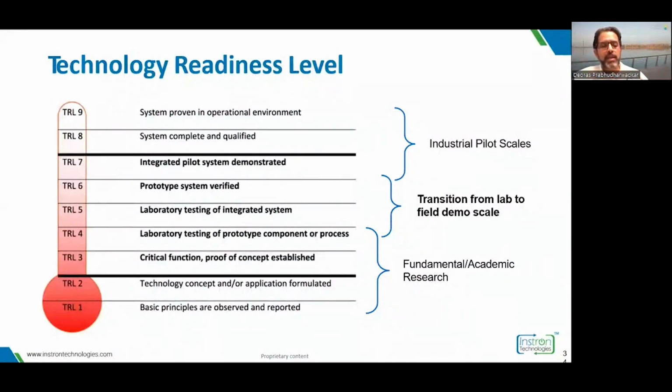at the lab scale. That's going to be the TRL 3, and the TRL 4 to 6 is where you start going out of the lab, from a bench scale to a lab scale, looking at perhaps the first opportunity to build a pilot plant. This is exactly where we start developing the full system, right? And then you take the full system, you turn it into a prototype, you then take it to a field. That's your TRL 6-7, and then you actually test it in the industrial setup, which is what you saw in the previous slide.